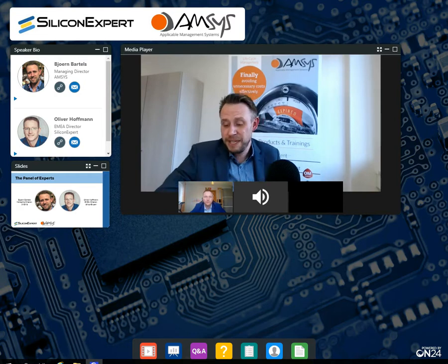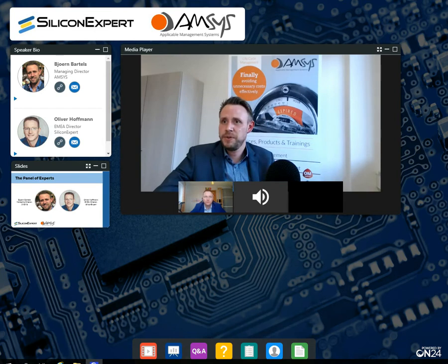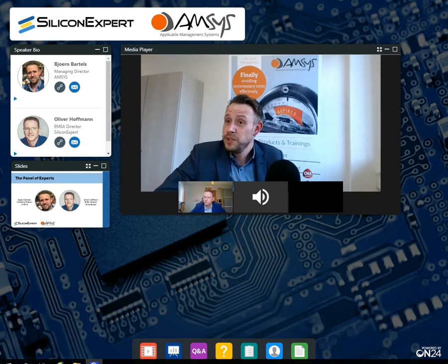once it comes to a proper and obsolescence-proof design. Maybe even what type of component is it? Is it a capacitor? Is it a RAM? Is it an IC? What type of manufacturer is it from? Do I have alternatives already qualified in my design? How long do I actually want to use this item in my design? Is it 5 years? 10 years? 20 years? Can I actually stock the component? Yes or no? So is it stockable?